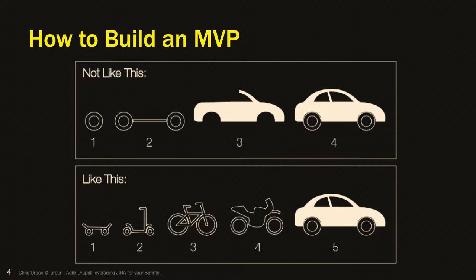Kanban is really, in my view, better suited for ongoing development, let's say maintenance, after you've launched. Now we're working towards the next release. That's when you shift into Kanban. But if you've got a time deadline, you've got to get a site launched, you want to do sprint style or scrum style, and now you can prioritize and say, okay, what are we going to get done right now? We've got to get the site up and running, a core, add to it, and now you have a minimum viable product or the basics.